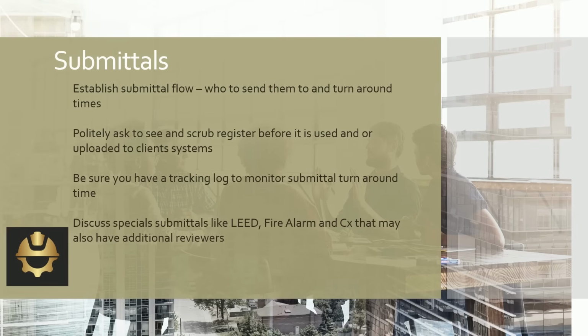The last little thing, I didn't make a bullet, but if you've been following us and you've listened to us talk and you've watched our video blogs, you've probably heard us make mention of submittals being included in the design. And this is an option, and we have run it, and we were actually the first QC managers to get 95% of submittals on a Corps of Engineers project in the Omaha district approved with the design package, meaning we had the entire team bought out before the design started.